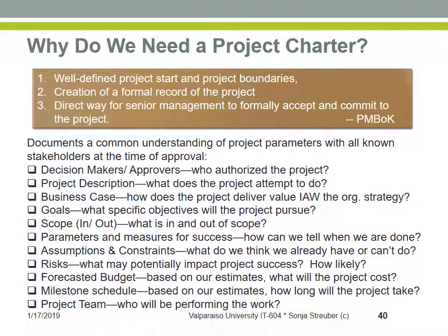And here is why working without a project charter will lead to project failure. Because a project charter defines the project start and the project boundaries. It creates the formal record for the project, and it is a direct way for senior management to formally accept and to commit to the project.